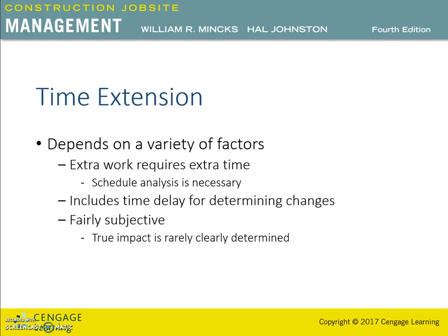As mentioned previously, the daily documentation of weather and construction activity is essential in determining appropriate time extension. Delays in the project from unexpected sources also will extend the contractor's job site overhead, resulting in a request for compensation for this extended overhead cost.